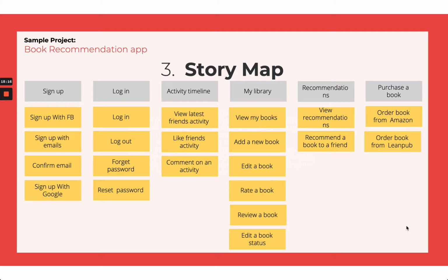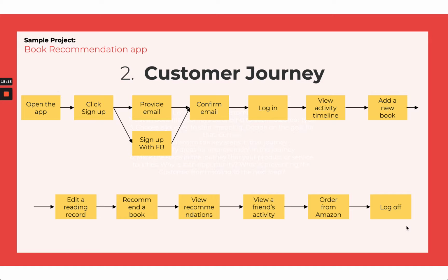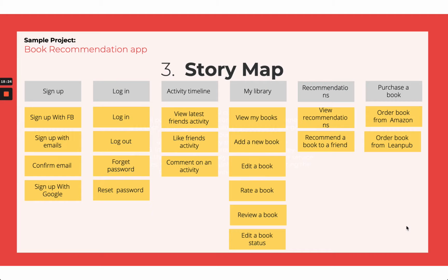As you can see, I tried to understand the top, for example, five or six steps in this journey and defined them as epics, and then I broke down everything I could for each epic into stories. It's okay if you define a lot of stories.